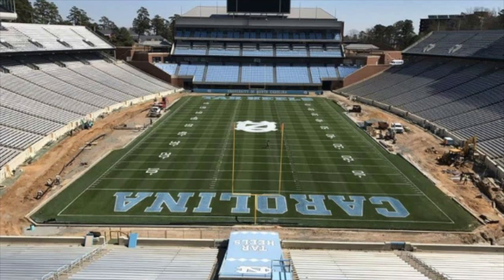On the right side, somewhere in this process, they decided, while we got this thing torn up, we ought to replace all of our electrical and all the utilities and all the ESPN and whatever else. And we can just snap our fingers and make that happen. But the change orders that occurred through this job ended up being well more than what the original job was going to be. I mean, it over doubled. All these things were basically thrown in, but the end date didn't change. We still had to have it ready for the first football practice.